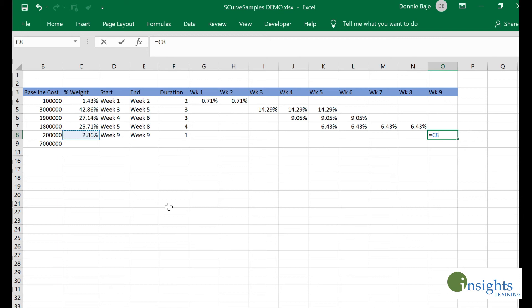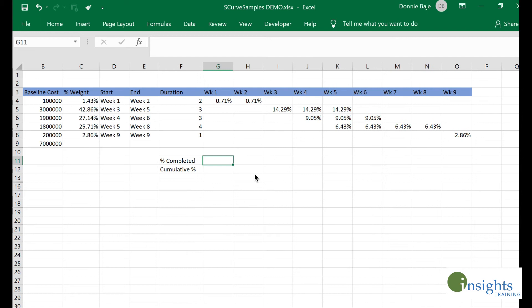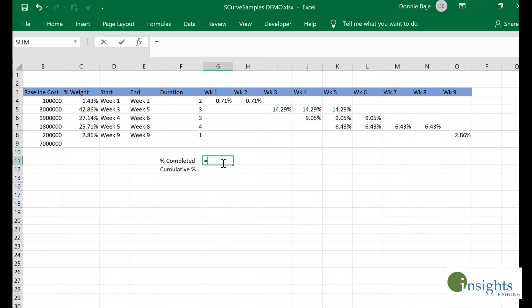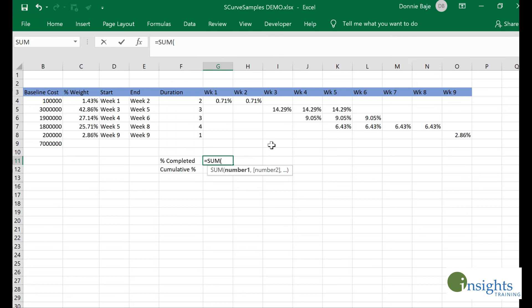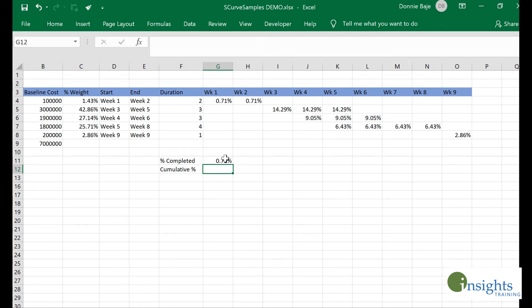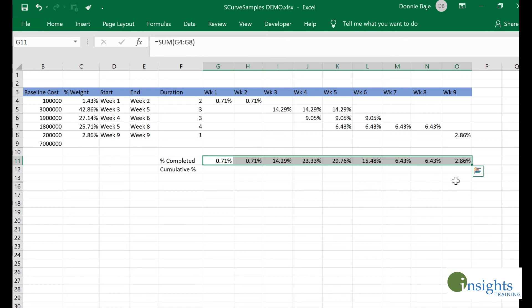I want to check the percentage completed or percentage utilized per week. As you can see, some stages of the project will overlap, so we want to get the sum or total for each of the weeks. That's done by using a SUM of each of the weeks, then I'll drag it until the right side.